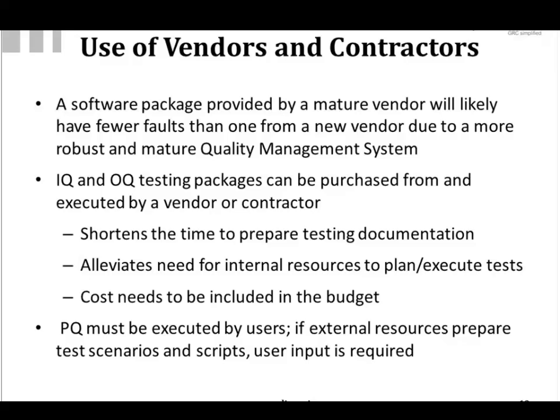And if you think that there are issues that are going to be coming up, the OQ is going to root out a lot of those. You're going to find deviations in your test scripts. You're going to find the software may not work as intended in some cases, and you're going to adjust things and have to do retesting as you go. And that's what makes it a lengthy process, and you never know exactly how long that's going to take because you don't know what things you're going to encounter.